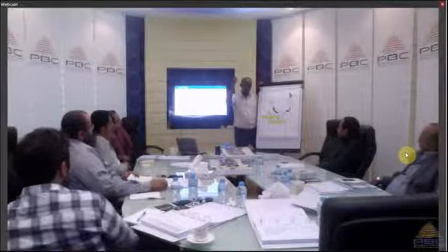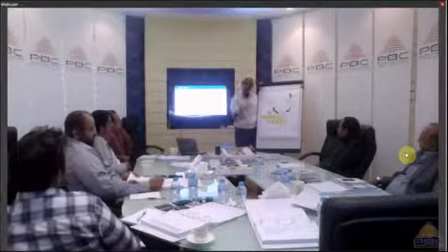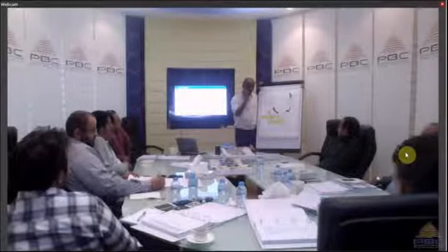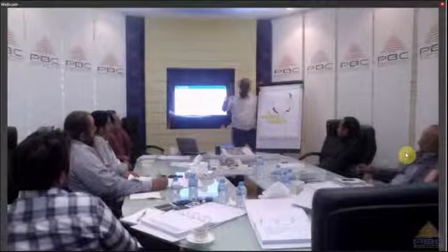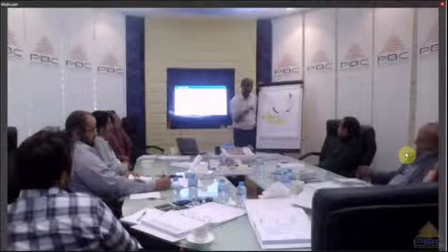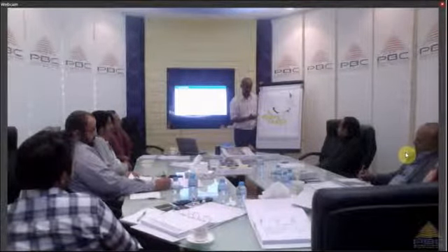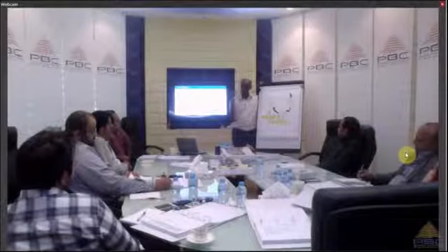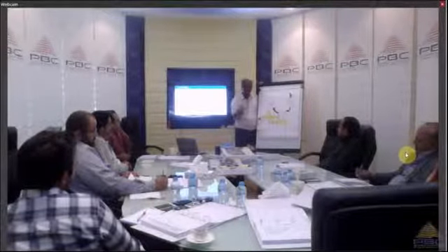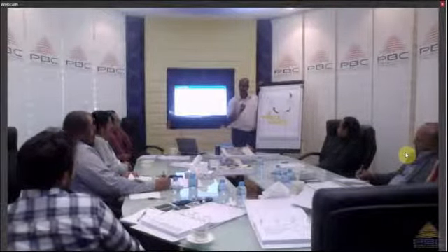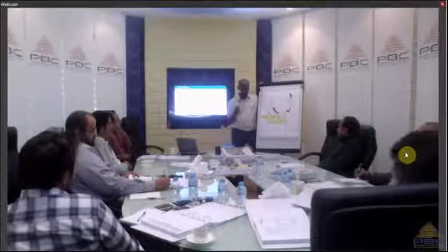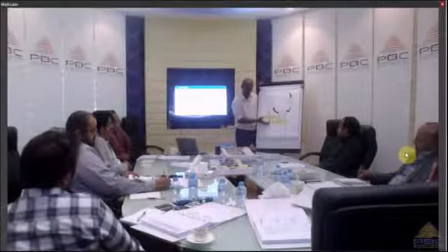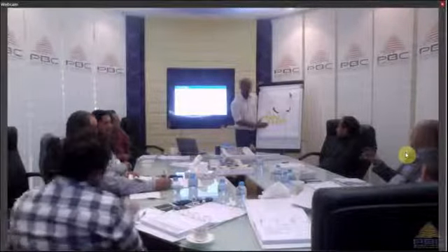When, number one, you can estimate the duration of completing this work, criteria number one. Criteria number two, when you can estimate the cost of completing this work. And criteria number three, when you can assign it to someone or a group of people. These are the three criteria I use to say to myself, okay, I can stop here, right?